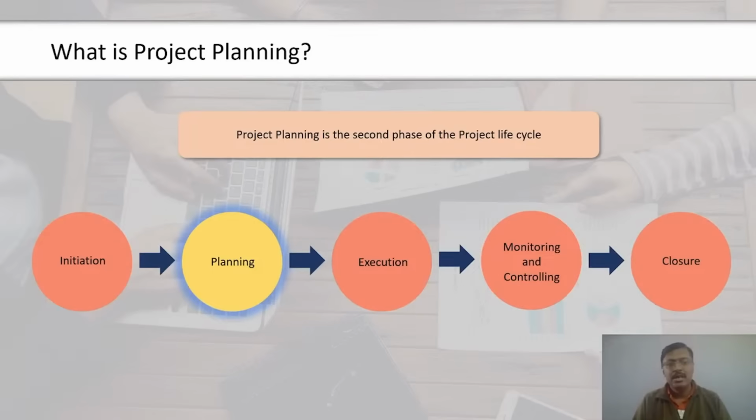And inside there is a mirror as well, right? If I break down further, if I take a seat as an example, the seat has a base, the backside, headrest, then the seat mount, as many things come up. So I keep breaking down like this until logically I cannot subdivide. Similarly, if I take exteriors, I can take body, bonnet, then the outside rear view mirror. Likewise I can do intelligence, like the engine system or intelligent AC system.